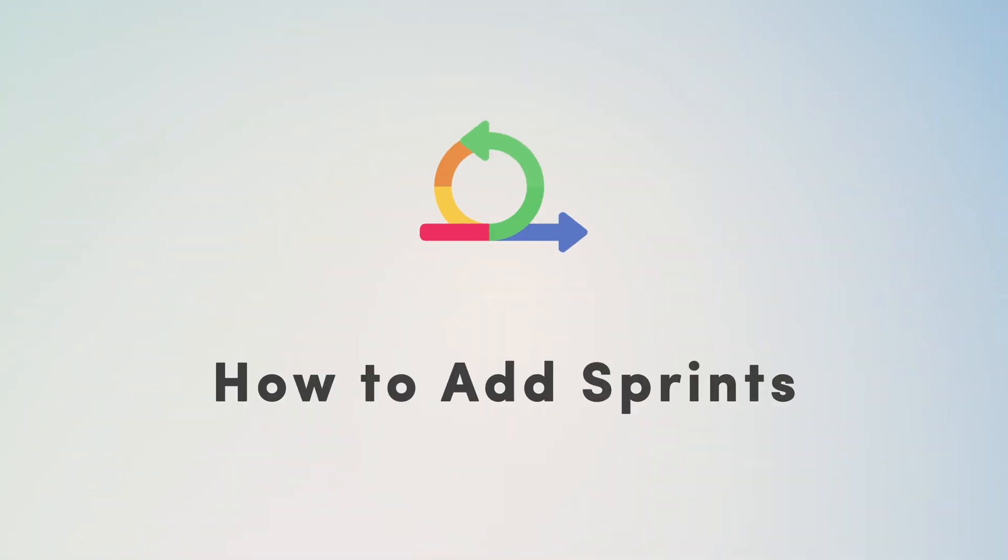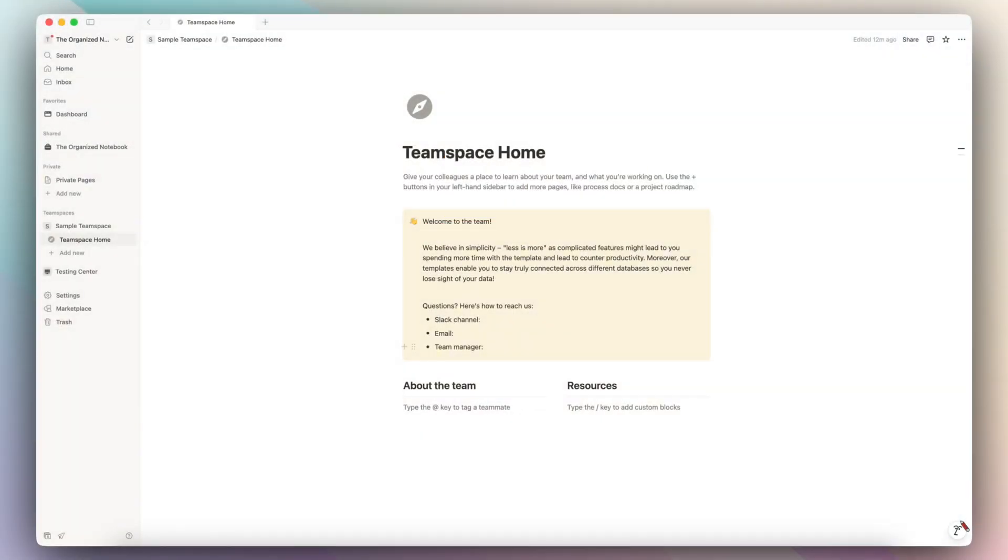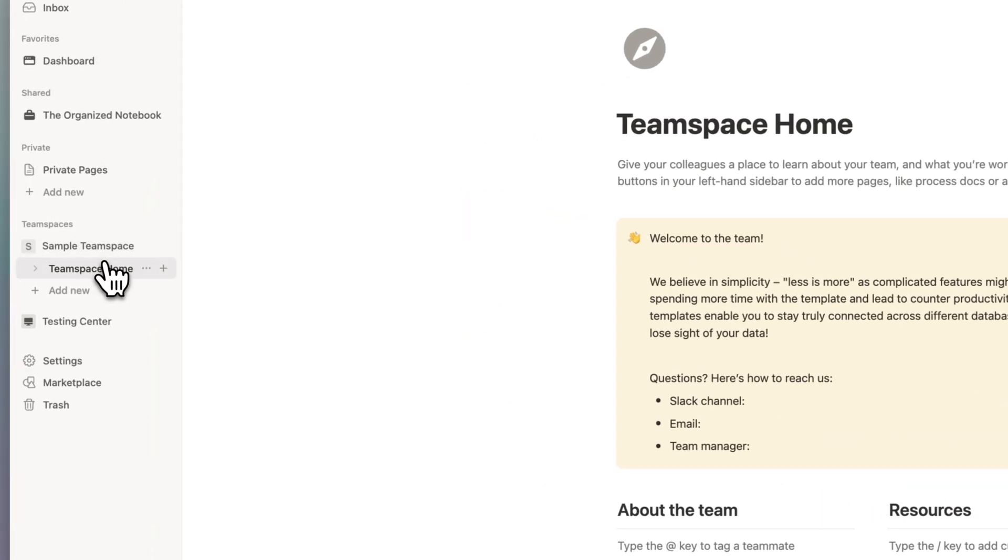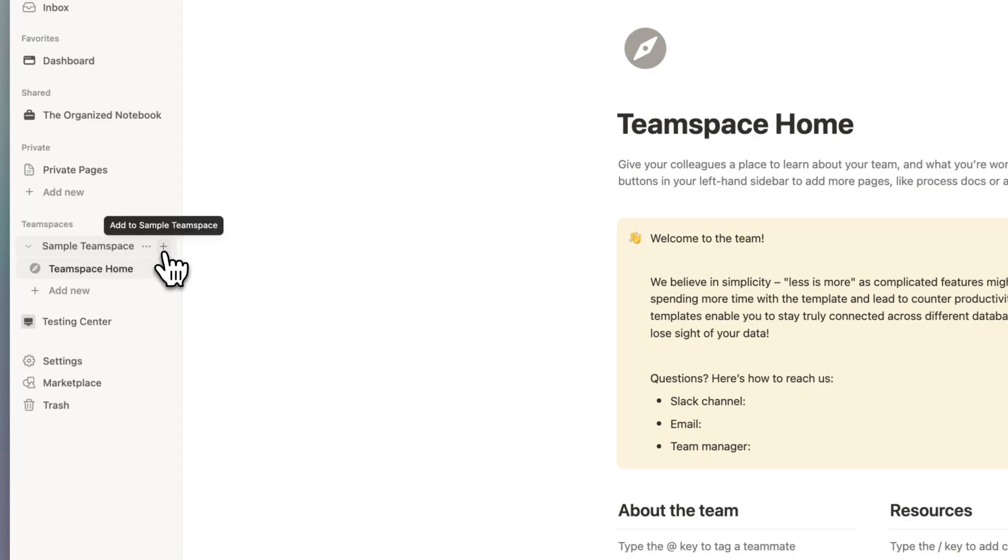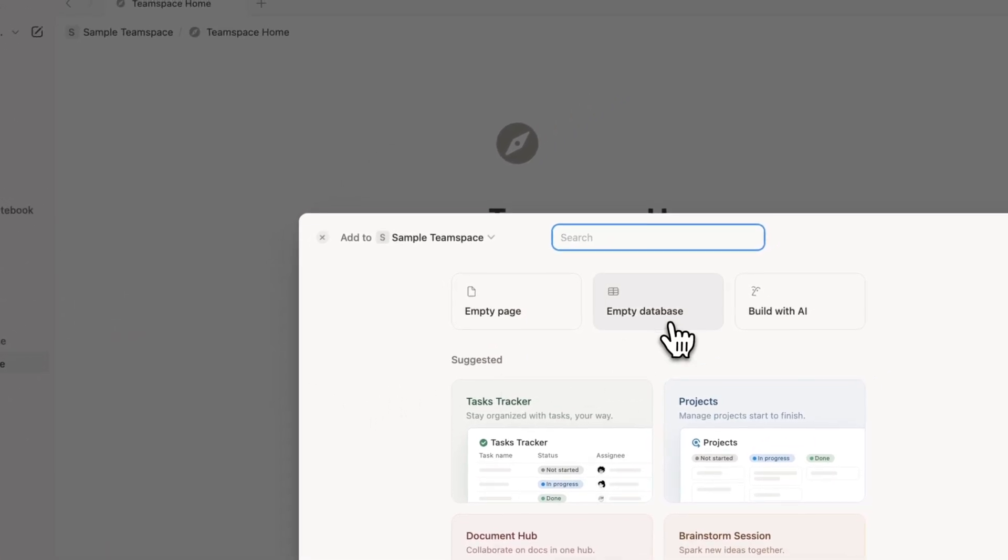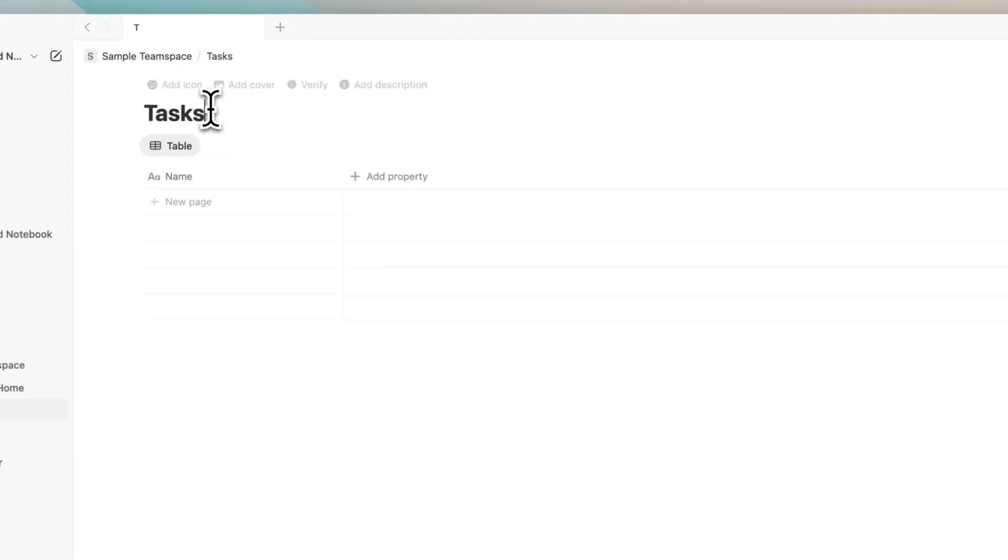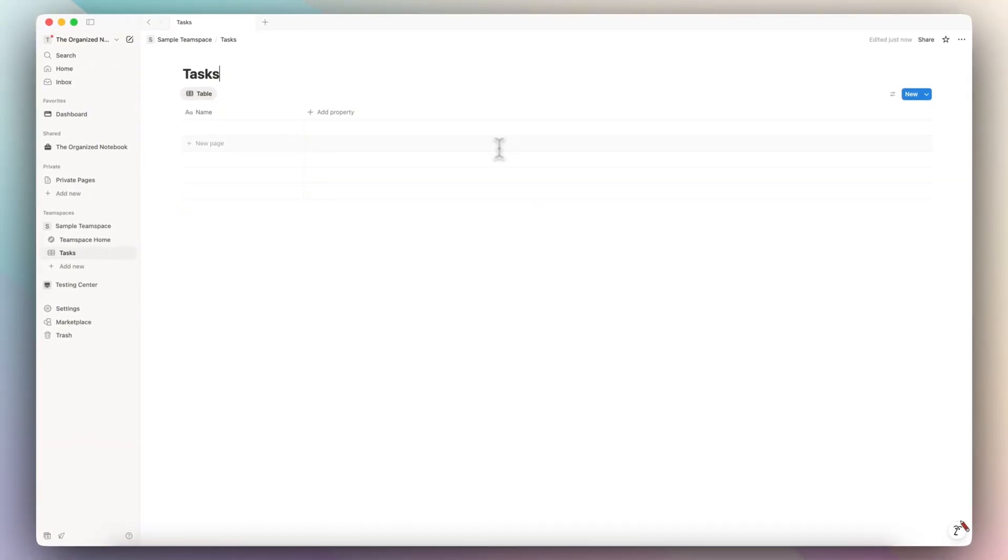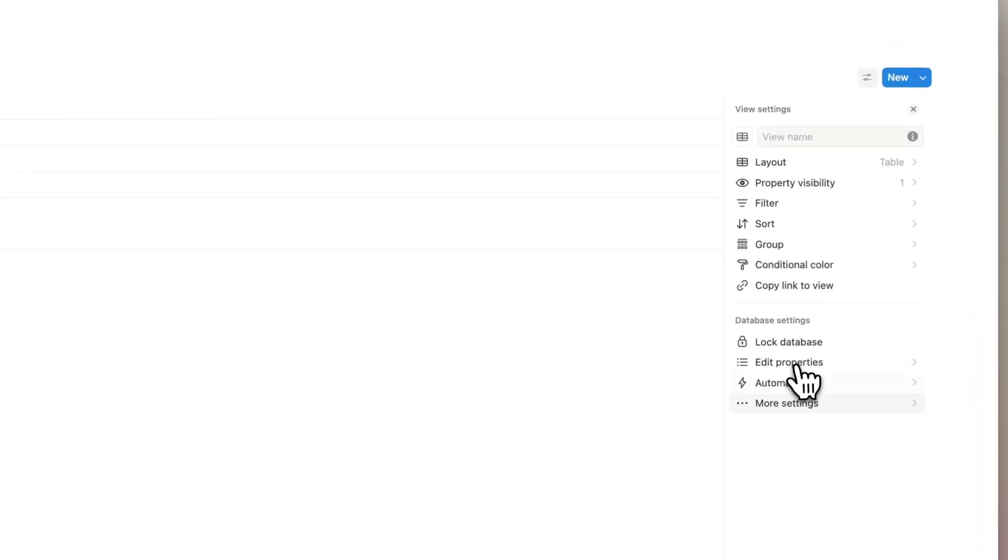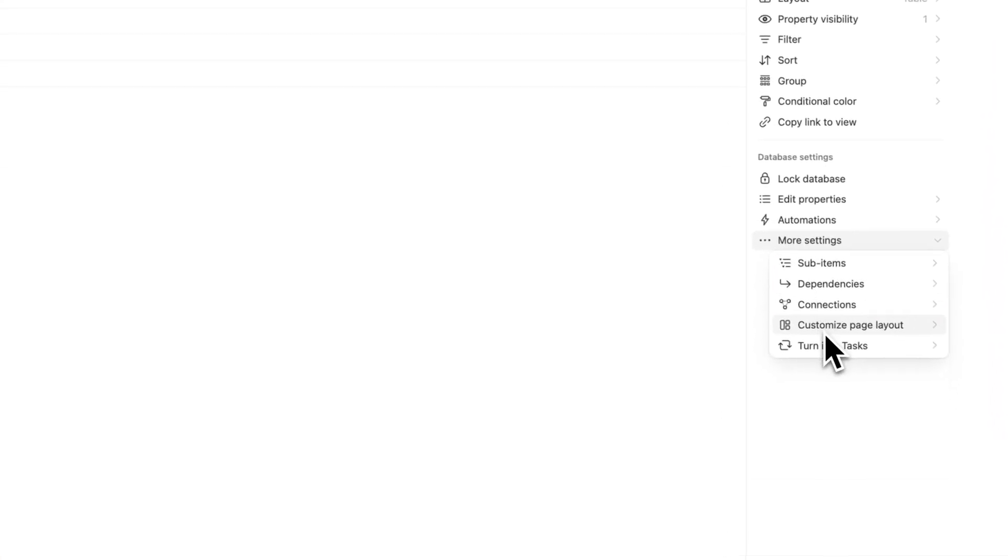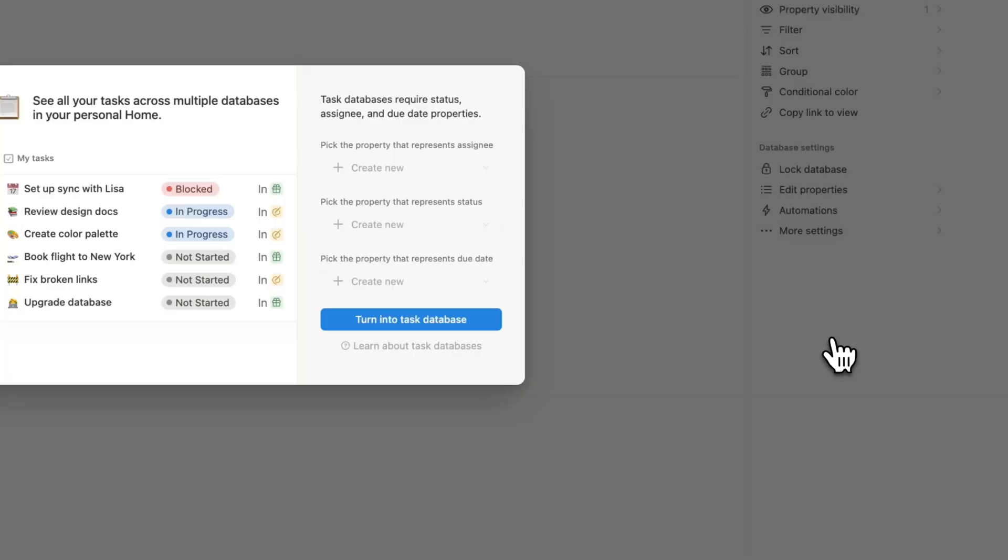To get started with sprints, you first need to have a task type database, and I wanted to show you how to do this through a sample team space. Most likely you'll have a team space homepage, and then you'll want to add that task database by clicking the plus sign here to add it to that team space. I'm going to click empty database. This one is going to be a tasks database, but we have to do one more step in order to implement sprints, which is to click the settings, then go to more settings, and then go to turn into tasks.